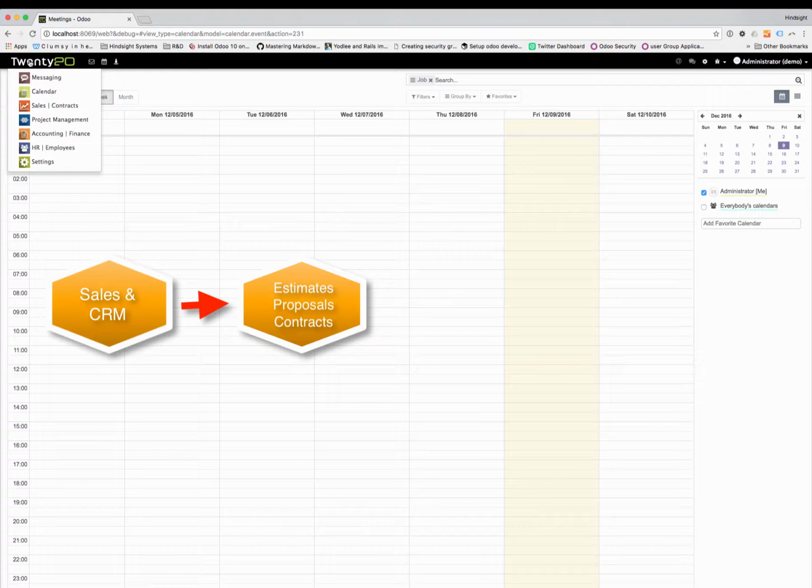In the project management phase, we are keeping track of all of the important documents, such as RFIs, submittals, transmittals, specifications, and drawings. All of those important things, each with revision control, so maintaining which is the most current revision, but still keeping track of all of the changes that have been made along the way. We want to keep that story and tell a story about this project and how it has transpired from the beginning to the end.